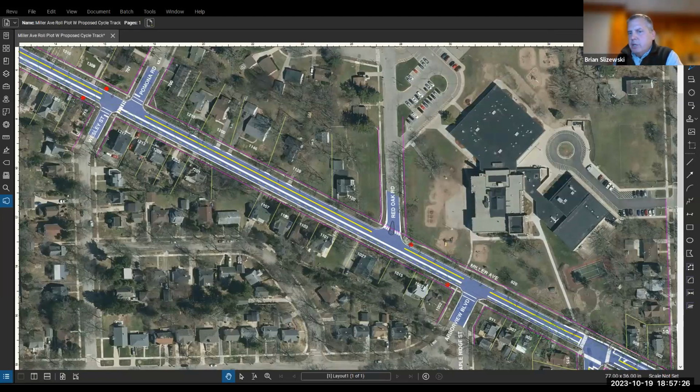There's always going to be some concrete work involved, even if it's a resurfacing project. It will probably be done along the length where the concrete work needs to be done. And then the asphalt work, it all gets done as part of one project. So you see all of it happening at once toward the end of the project, say into the September-October period.